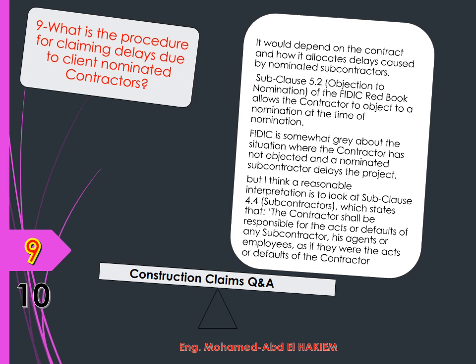FIDIC is somewhat grey about the situation where the contractor has not objected and a nominated subcontractor delays the project. However, a reasonable interpretation is to look at sub-clause 4 for Subcontractors, which states that the contractor shall be responsible for the acts or defaults of any subcontractor, his agents or employees, as if they were the acts or defaults of the contractor. This does not exclude nominated subcontractors, so would not allow the contractor to claim against the employer. The correct recourse would be to claim against the subcontractor for losses or costs incurred due to the subcontractor's delay.